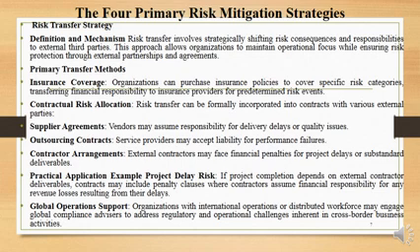Contractual risk allocation. Risk transfer can be formally incorporated into contracts with various external parties. Supplier agreement. Vendors may assume responsibility for delivery delays or quality issues. Outsourcing contract. Service providers may accept liability for performance failures. We also have contractor agreement. External contractors may face financial penalties for project delays or substandard deliverables.